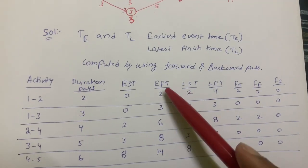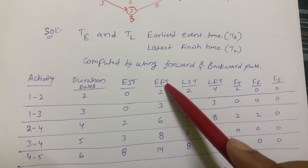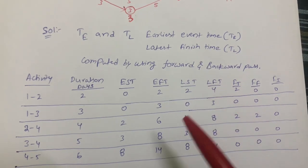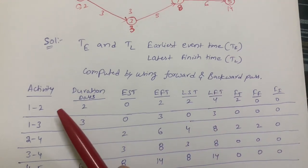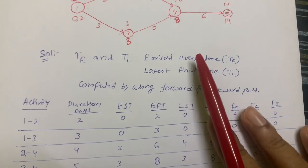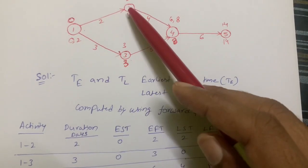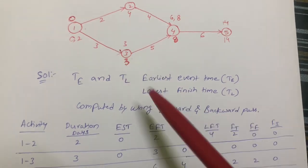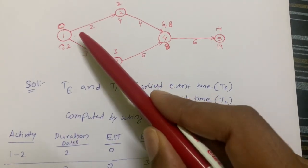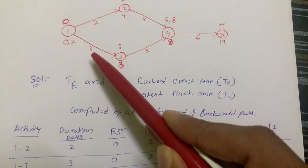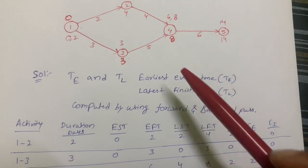First we calculate the earliest finish time (EFT). For activity 1-to-2, the finish time is 2 days. For activity 1-to-3, the finish time is 3 days.